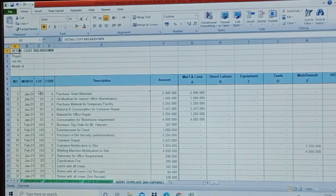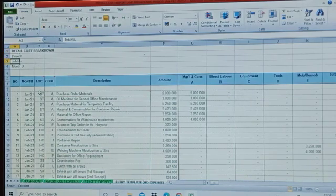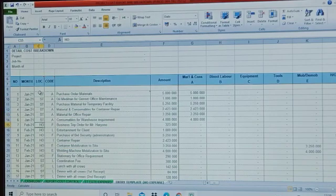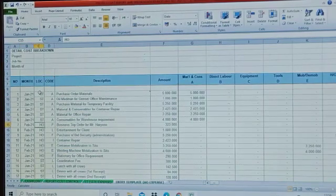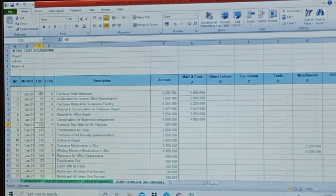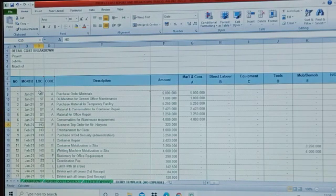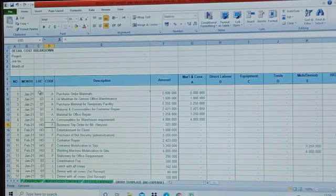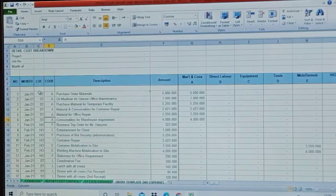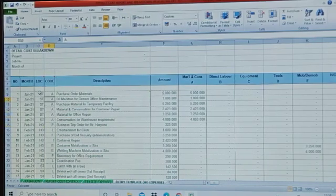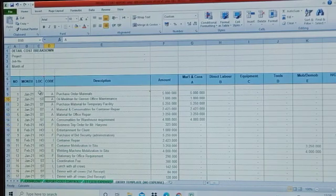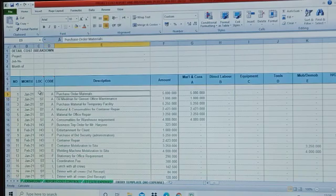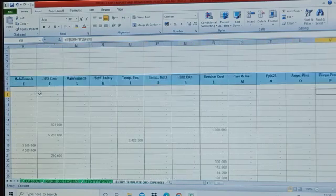HT means site office project cost, HO means home office project cost. Also cost code - here they are divided into 19 classifications in the form of letters starting from A to S.